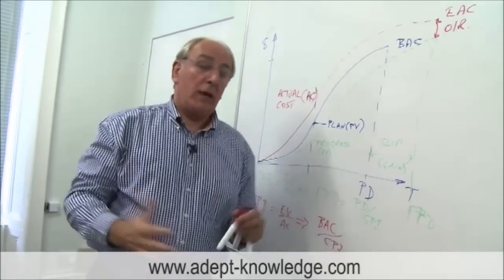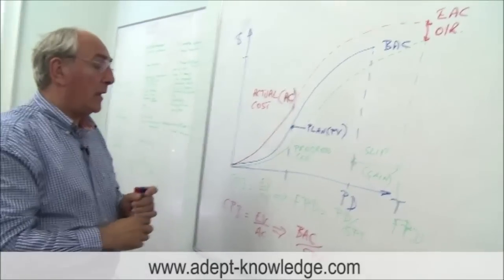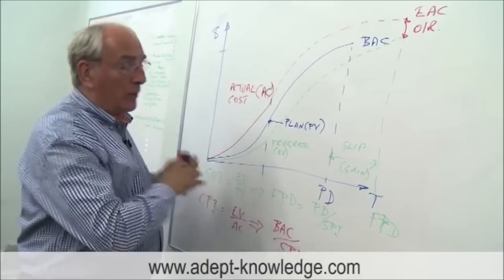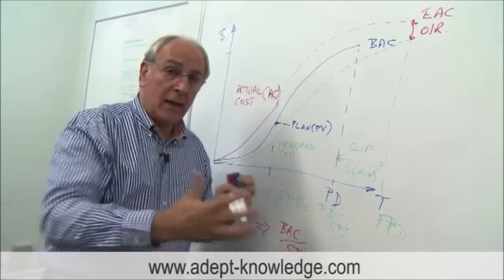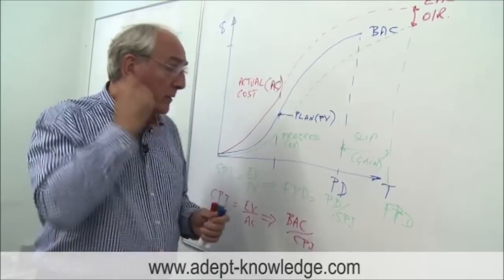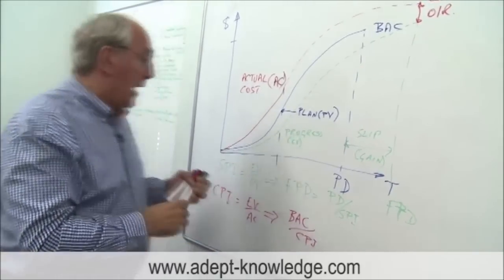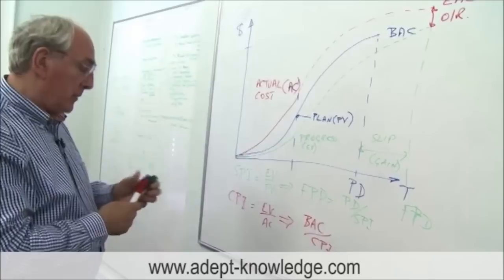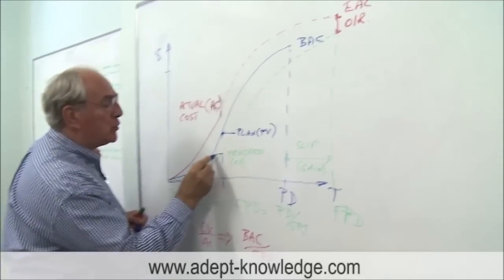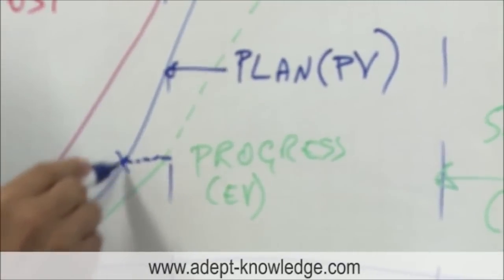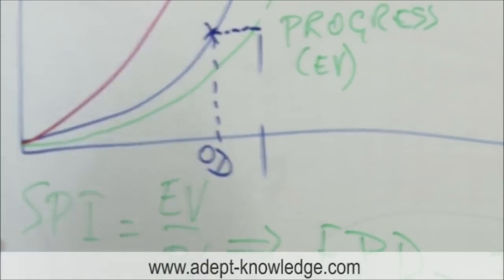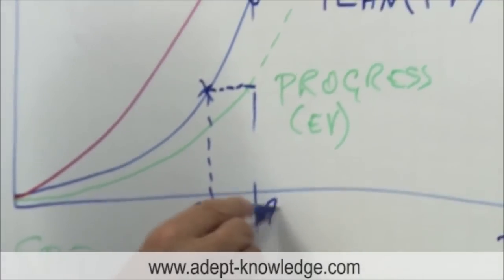There are some simple objections to this first index, the schedule performance index, and the objection to it is a philosophical one. Why use a ratio of costs or a vertical ratio when really what you want to do is to estimate something in time or horizontally? So in the British standard they've got a much better version of this that's been around since about 2002 and we talk about the relationship in time. Some people call that the earned schedule. We could say that we would have achieved or should have achieved that earned value at that point in time. We drop that down onto the timeline it's called OD the original duration and our time is known as the time now is the actual time expended.